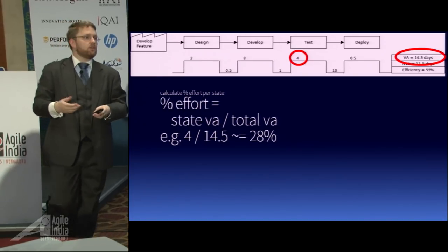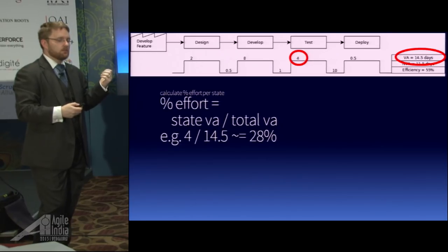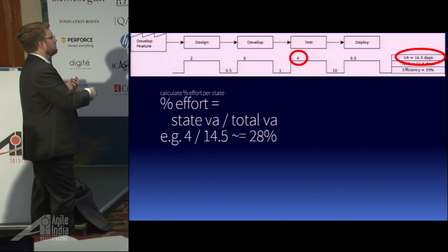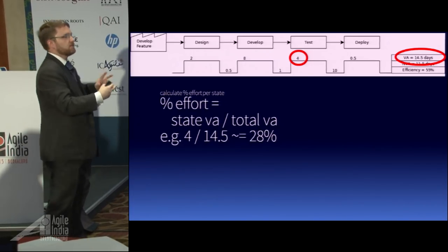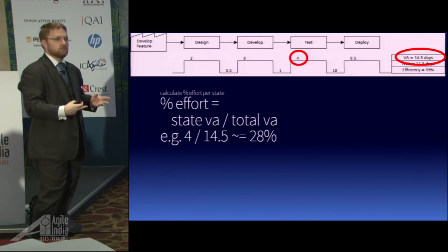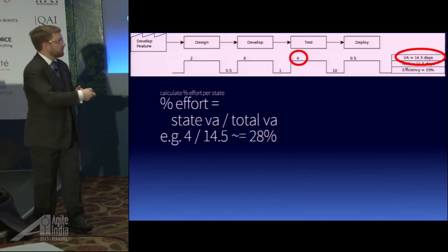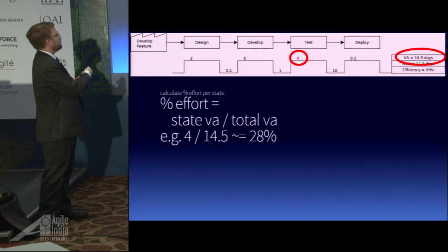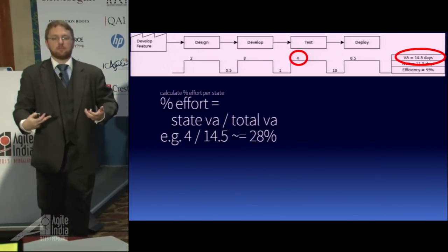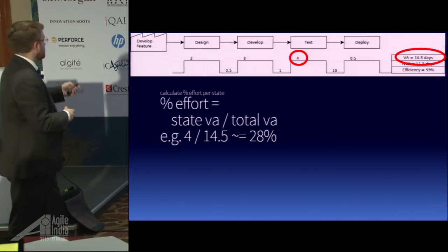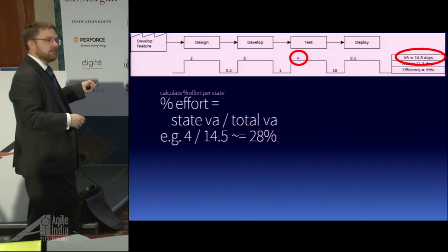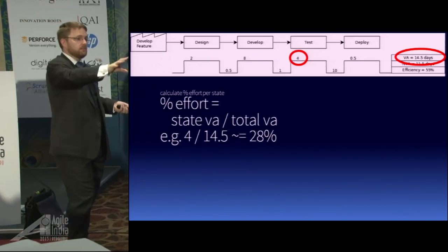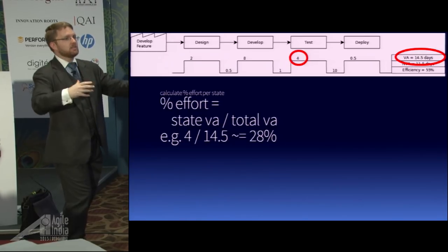Reducing cycle time can be one way to improve efficiency, but I can just as easily spend more time here and less time there — my total throughput doesn't change, but my cycle time might. Cycle time can be a measure but it depends on where the changes lie. Here's a good example: if I changed my development time to two days to deliver the same feature, my efficiency would go down but I'd still be delivering faster. So you do want to bring your cycle time down, but cycle time isn't a one-to-one measure for efficiency.